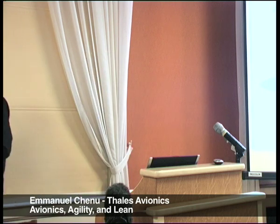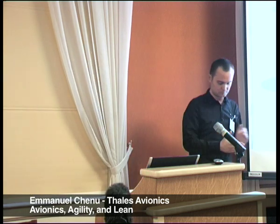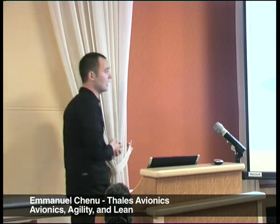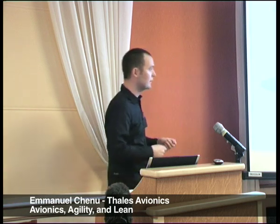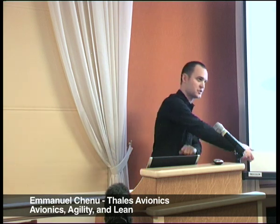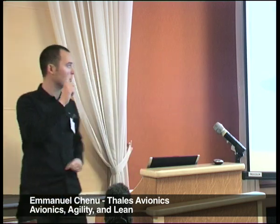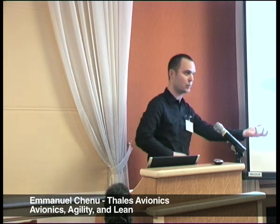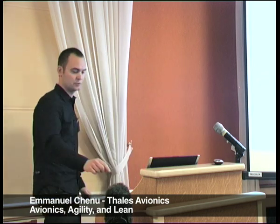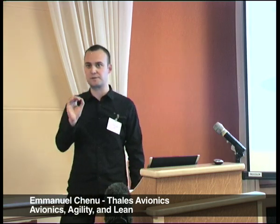The fourth principle of Lean is pull. As flow is introduced, let customers pull value. So, the features to implement are prioritized by the product owner in the product backlog. And the succession of iterations will pull the highest priority features out of the backlog and transform them into valuable software. So, by prioritizing the features, the customer is in fact pulling the development of his product. Just to finish, this is really important. Iterative and incremental development of prioritized features is just the pull system for product development.